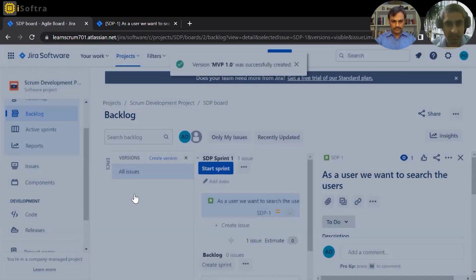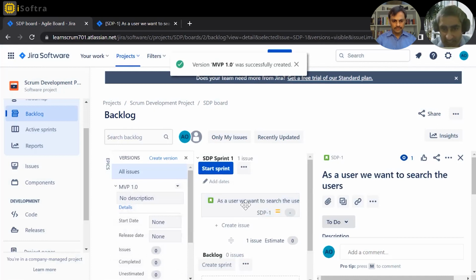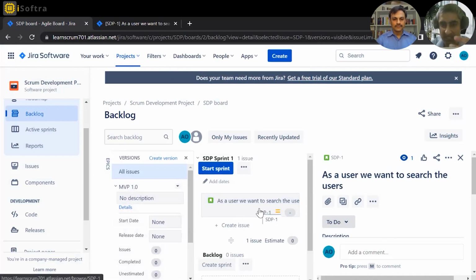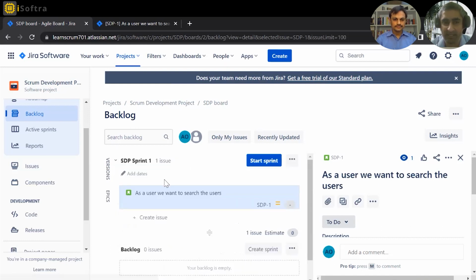And after creating this, we can attach these stories, which either belong to the same epic or to any other epic, under one release. And we can track the release as well over here. Because a release might have a combination of different epics, some features from a particular epic, some functionality from different epics. Perfect. And we set up a release after 2-3 months. So that kind of tracking is also available there.